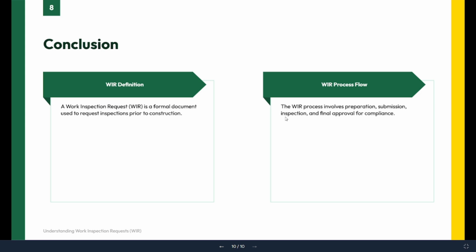And whenever you get the approval or rejection, please store it in your device in a systematic way. Please make your own tracker of whichever inspections are approved and whichever got rejected, and the rejected ones have to be resubmitted within a specific date and time in order to avoid project delay.